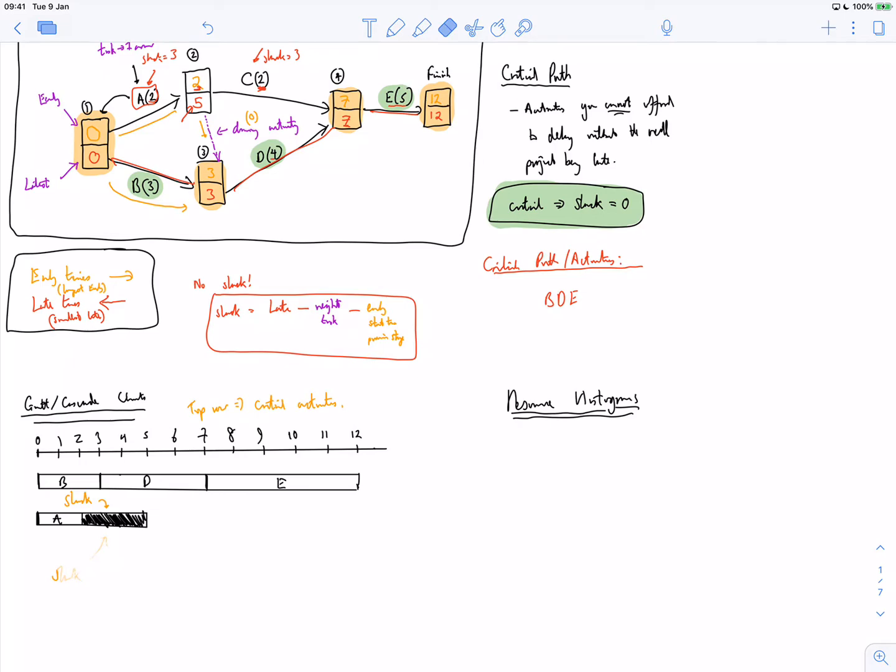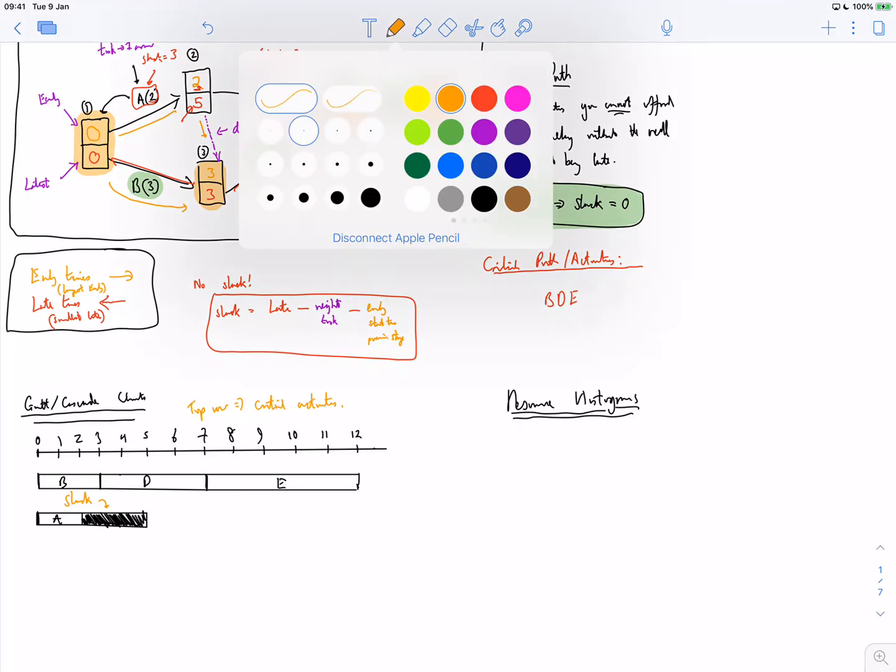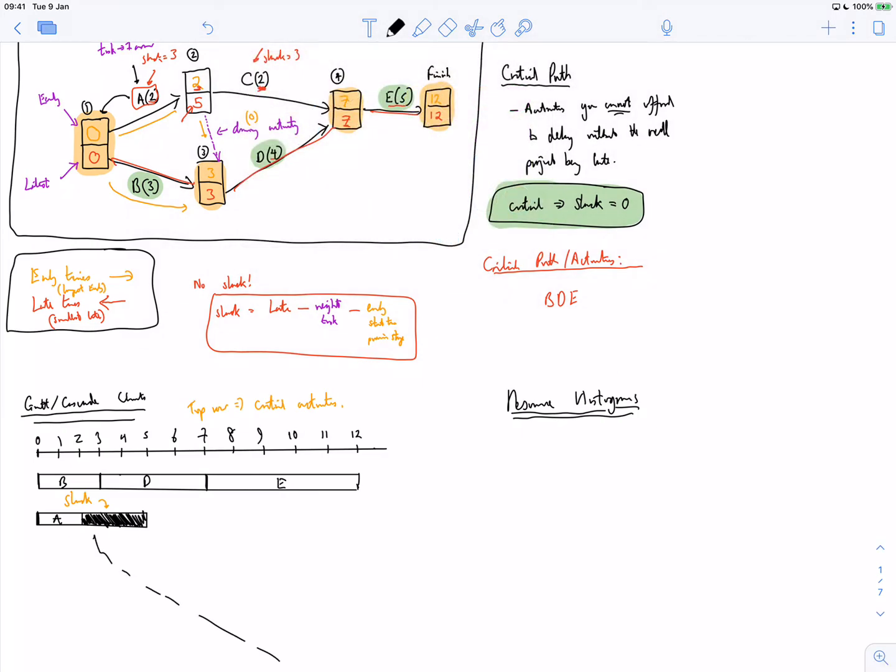For a cascade diagram, I'd then carry on with the tasks and cascade downwards like so. So the next task will be C, and the earliest that can be is 2. So I'll start the box here at 2, and it's worth 2, so I can go all the way to 4, like that, so it's only 2 wide. This is task C, and the latest I can finish there is 7. So that has a big slack of 3 as well, and that's the slack of C.